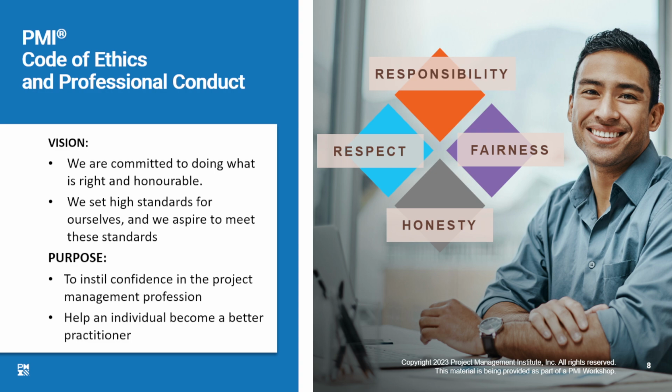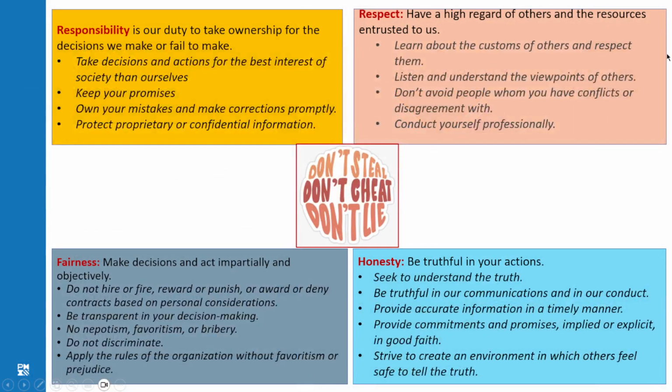Now, the PMI Code of Ethics and Professional Conduct has 4 key values: responsibility, respect, fairness, and honesty. Now, what is responsibility? It means that project managers are expected to maintain confidentiality, to comply with the laws and regulations of the land or of the country that they are working in, of the industry that they are practicing in.